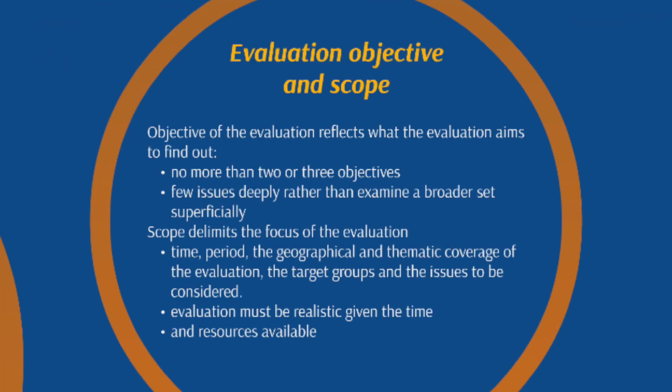Also, you should never forget to limit the scope. The scoping is very important, in order to get good pricing and in order to enable the contractor to see how much work is needed. We will talk about that later. They will have to give you the offer based on the different tasks and questions. And this is also a test where you can see whether the contractor understands the context.